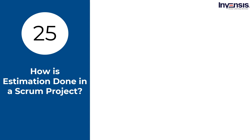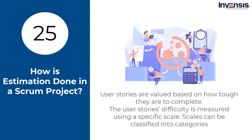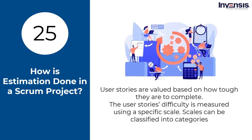How is estimation done in a Scrum project? Estimation is done to consider user stories for the sprint, by priority and by the ability of the team to deliver during the sprint. User stories are valued based on how tough they are to complete, measured using a certain scale. Scales can be classified into categories — for example, sizing by numeric values such as 1 to 10 or the Fibonacci sequence.